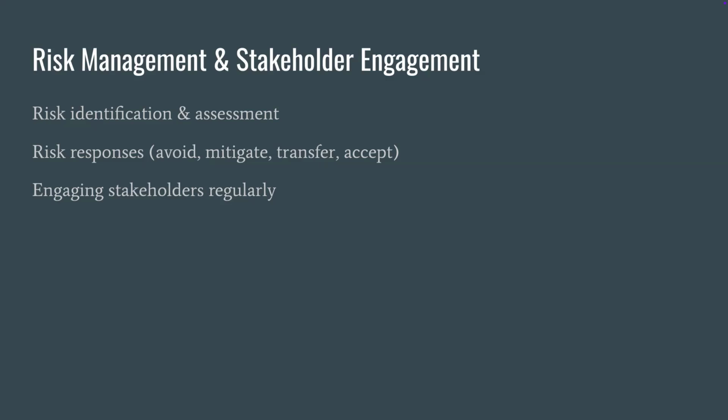You can think of it as, the example would be like insurance or outsourcing. Accept is when you acknowledge the risk and deal with it if it occurs.